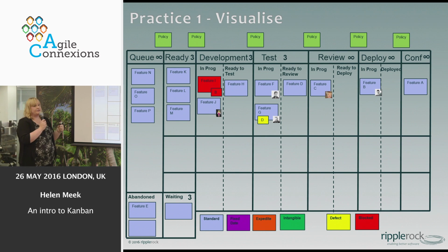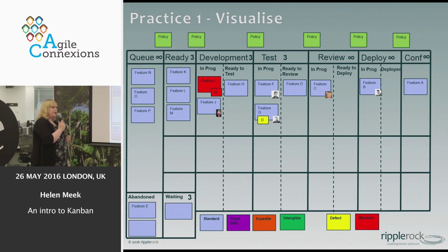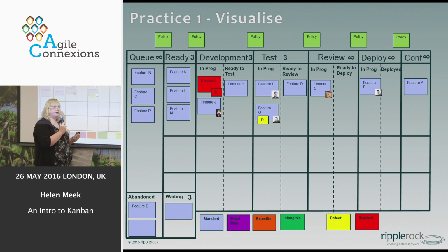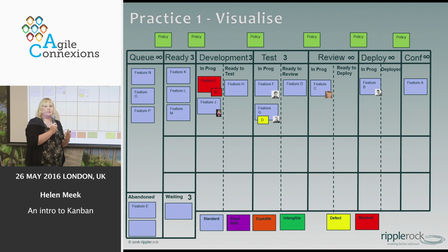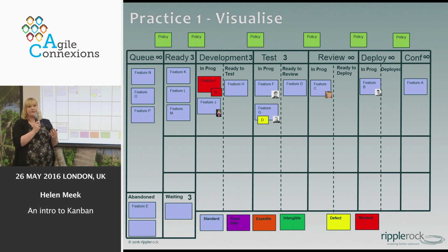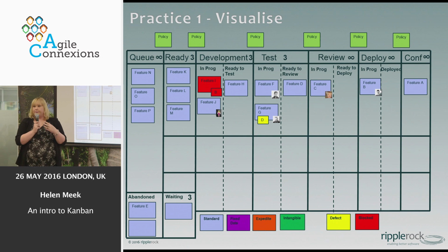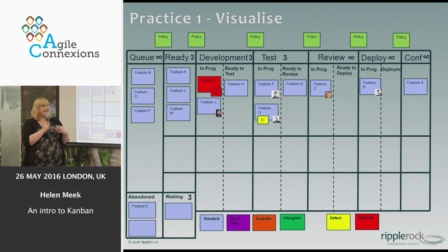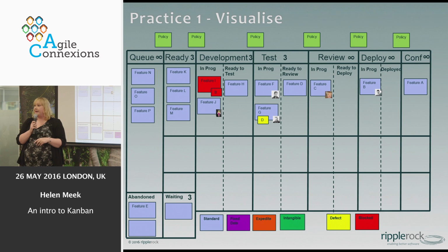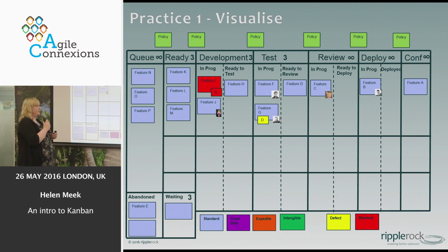With your visualization as well, I also have this little thing called a cruise-by factor. As a coach, you want to be able to walk past your board and get a real sense about what is happening here. If I see lots of defects, there's possibly a problem with quality. If I see lots of blockers, I would know I need to resolve that. So visualizing the problem is absolutely key to understand how the work is behaving, and then what we can do is make some decisions and assumptions on how we're going to solve those as a group of people.